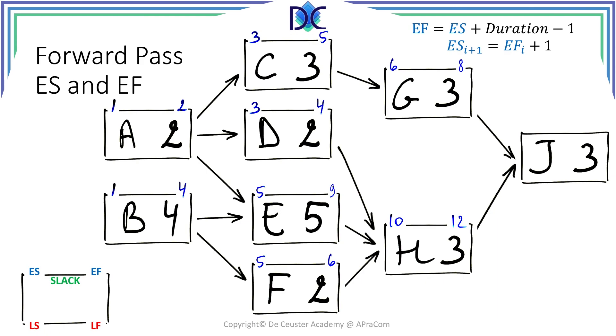And finally we can look at J. We have the predecessors G and H. So J can start at 13th of April. 13 plus 3 minus 1 is 15. So the project will end on the 15th of April.